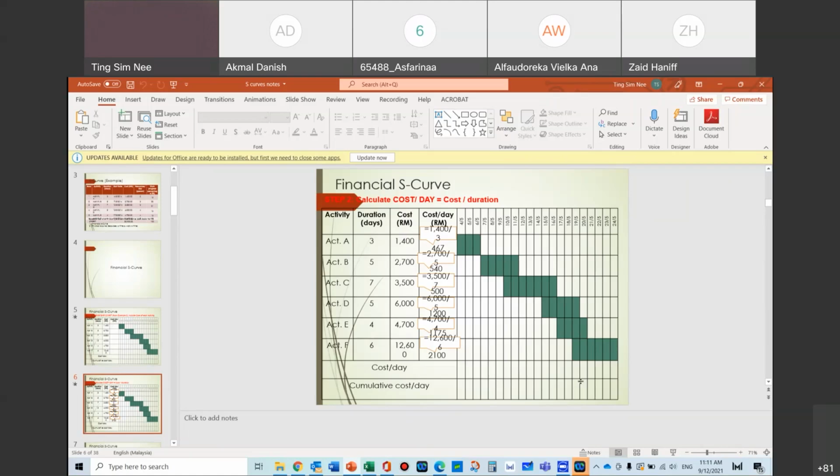Pipeline, I would say 70% of the money is in the first 3 months, because you're buying the pipes, you need to pay for them, and that is a lot of money. The labor and everything else is a lot cheaper. If this is pipeline, water reticulation, 3,500, I would say I will have 1,000 in the first 2 months.